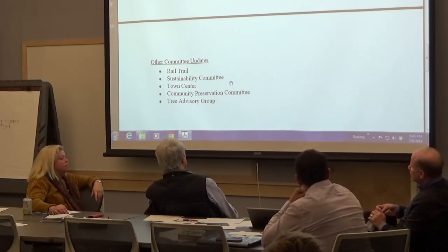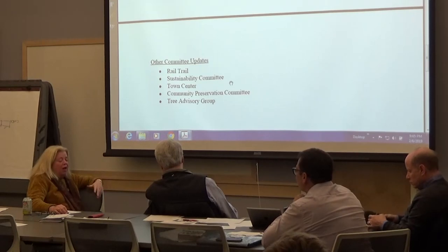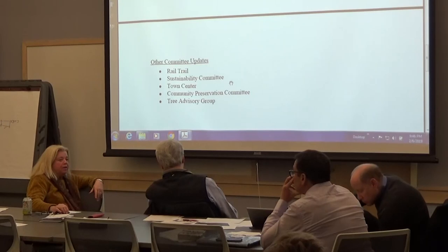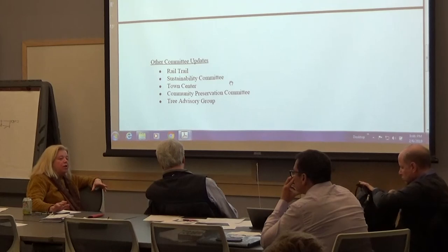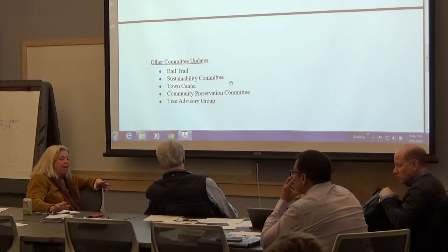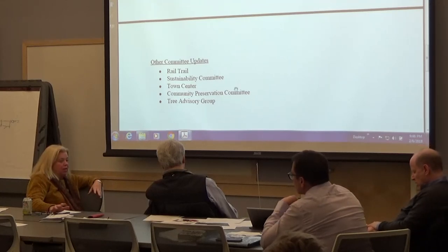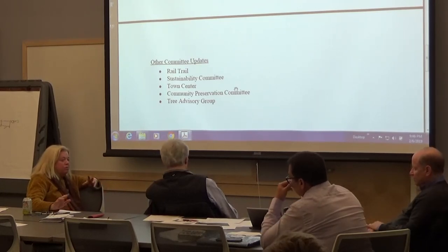Town center plans are being bid. I saw you guys forwarded my memo. It wasn't meant for that, but okay. My real concern is the irrigation system and the town well. They have a comment in there which says water everything from a truck, and then they have 430 pages of how you do the irrigation system. If they do an irrigation system, they don't have a well. I'm hoping they're going to water by the truck. But if they are doing an irrigation system, they have to do a well, and the memo doesn't deal with that.